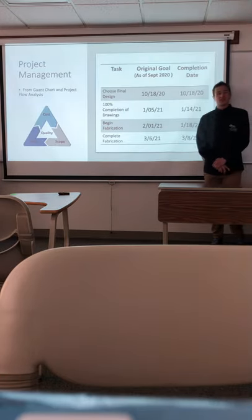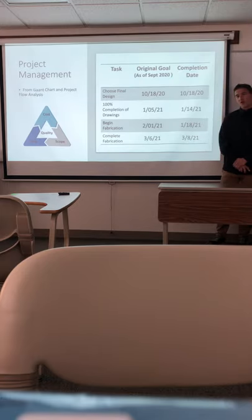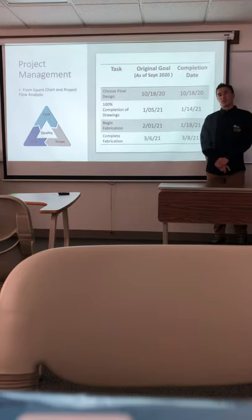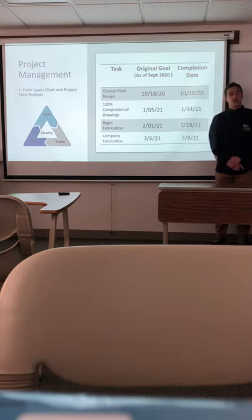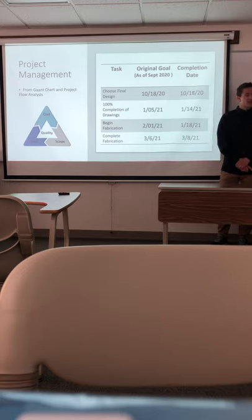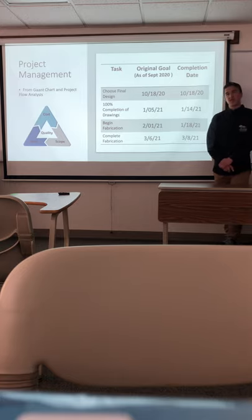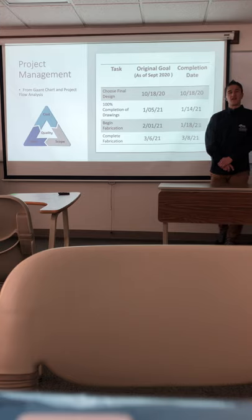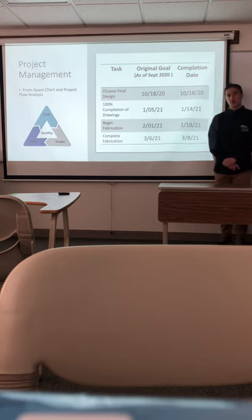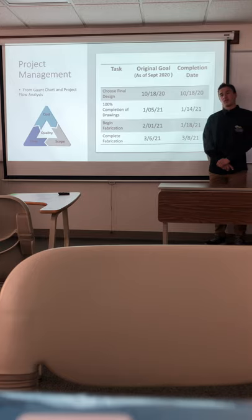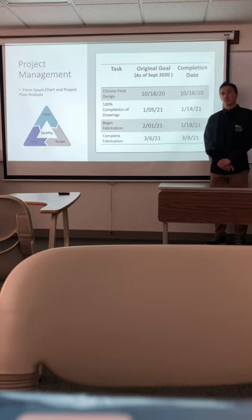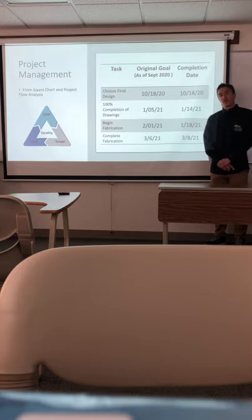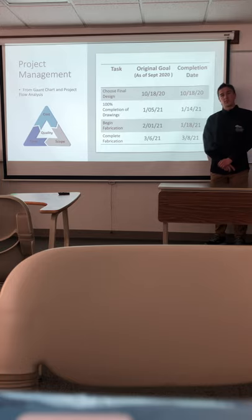Continuing on the project management discussion, we laid out our milestones within the first month of the semester, and you can see some of them here when we got them done. Our first major milestone was to get the final design done. We did that in October, then we moved on to drawings, and that took about two months, and we stayed on schedule really well in the fall, but because we had limited time on campus during the fall and spring semester, because of the longer Christmas break, we wanted to make sure those drawings were done before we got back in the spring semester, so that we could begin fabrication right away and leave us some time for assembly practice.